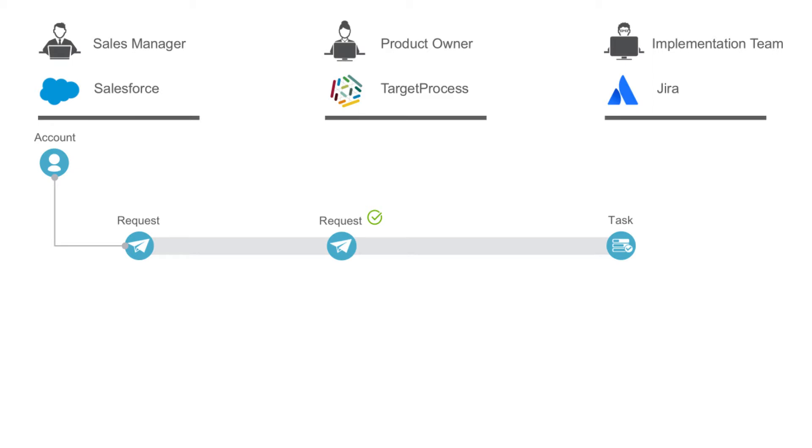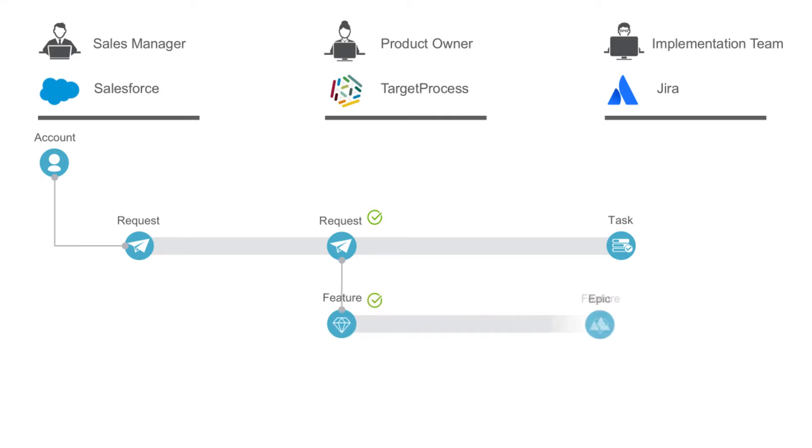Which will tell Tasktop to flow the request to Jira as a task so that our developer can research it. Once analysis is complete, the product owner is ready to create a feature in Target Process and add it to the backlog. Then, once that feature gets added to a release plan, the product owner can check the implementation field on it, which will tell Tasktop to flow it to Jira as an epic. Now our implementation team is ready to begin work on that epic and they can break it down into stories within their own tool.